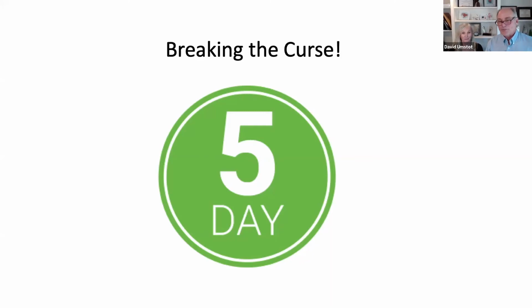So what does that do? If you end up getting it done in 3 days, which is the real time that's required, and whoever's following you has other commitments, then you potentially lose 2 days of production on the job site if people can't move in immediately behind you. That's a challenge. Conversely, if you say 5 days and it takes you 6, then whoever's following you shows up on day 6 with their crew, and now they've got to find some type of workable backlog somewhere else, or worse, get sent off the site, which is probably not going to happen.